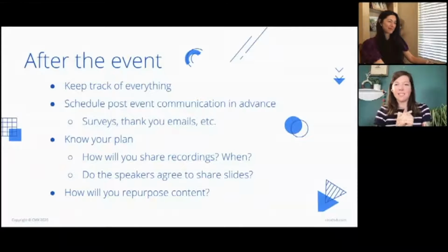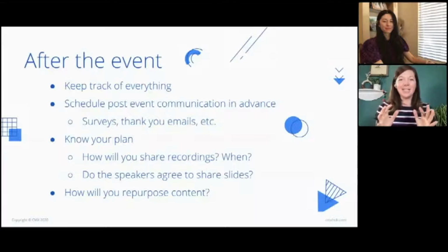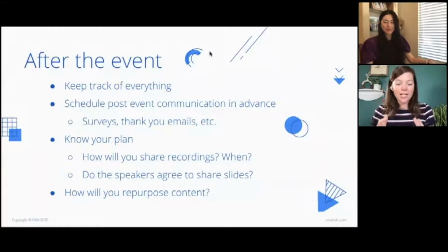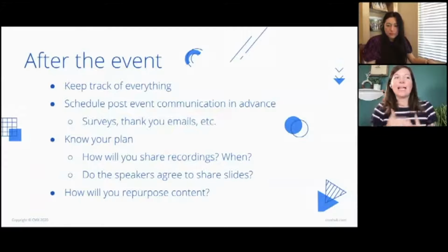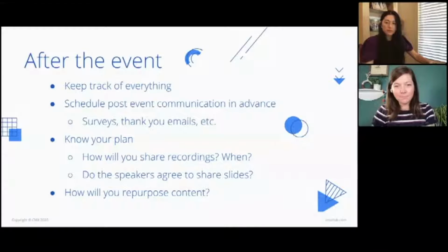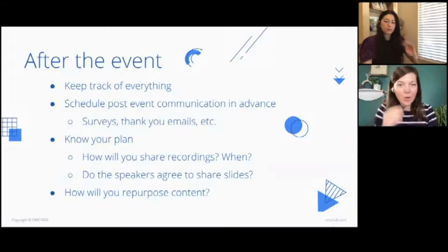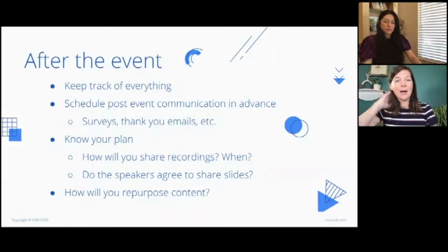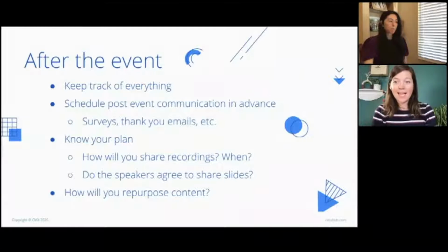After an event, your brain is exhausted, all of your adrenaline is gone, you're tired. So the less you give yourself to do the day after an event, the better. Scheduling those emails, scheduling surveys to go out, all of those sorts of things before the event is going to help you out a lot.